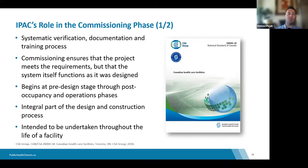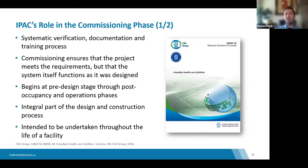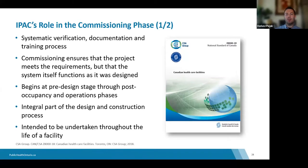It's important that all stakeholders who will occupy or use the space are involved — broad engagement is essential. For example, having environmental services or cleaning staff at commissioning meetings is valuable because they have a specialty of practice that needs to be covered. Facility maintenance staff should also be at the table to ensure there is capacity to maintain whatever is being implemented.